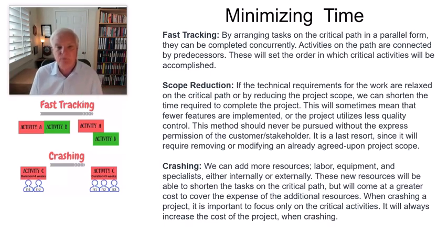Now, when we crash a project, what does that mean? Crashing a project means that I decide that we are going to take every resource we have available to us, I don't care what it is, and we're going to throw it on this project, and we are going to complete this project, whatever it takes. Now that means you may have people that have skill sets that aren't complementary for what needs to be done on the project, but we're going to use them to do that. Everybody jumps on board and everything is done. All these new resources are added to try to shorten the tasks on the critical path.